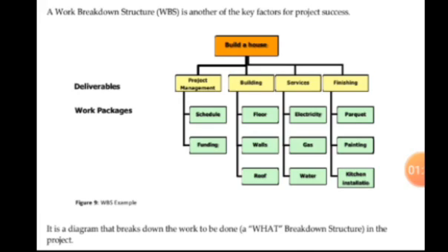Then the next deliverable is the building. The work packages under the building are the floor, the walls, and the roof. Once you are able to accomplish the floor, raise the walls of the house, and then roof it, you have delivered the building.